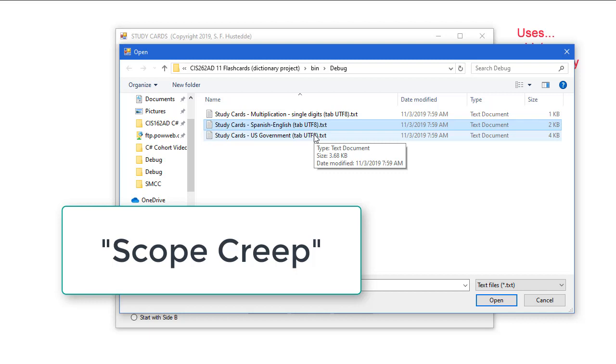You have to be aware of scope creep, especially working with a client. And in a contract with a client, you probably want to spell something out in terms of if they change some of the parameters or add new features in, those are going to be more costly, because sometimes adding those new items in will force you to change things you've already done. And I experienced some of that as I did this project.